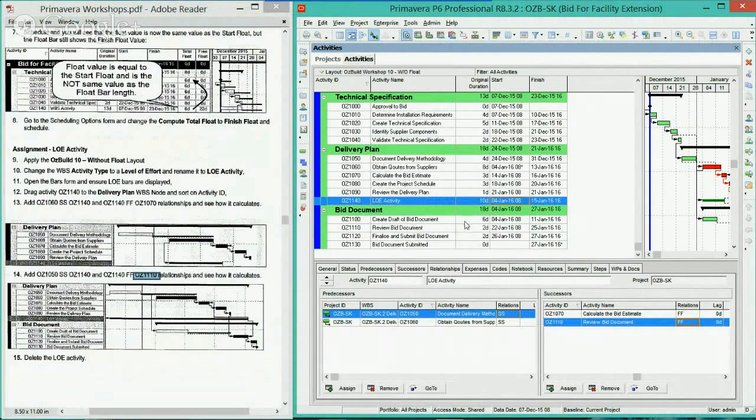So what it's supposed to do now is actually calculate, even though 1060 is there, 50 precedes it. So it will take the date from 1050. So right now it will say December 24th, and with 1110 coming after 1070, it will show January 25th. So I'm going to go ahead and schedule.